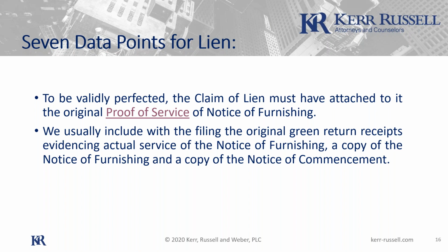But what you don't want to do is overstate your lien purposefully. That could result in the lien being dismissed. So I usually preach caution if people are thinking about adding something else that doesn't qualify as a good faith extra. The fear is that the whole lien could be dismissed. I mean, if it's a clerical error, often the court will decide that they're just revised down to the correct number. But the fear with overstatement is you lose the whole lien. So just a word to the wise on that.